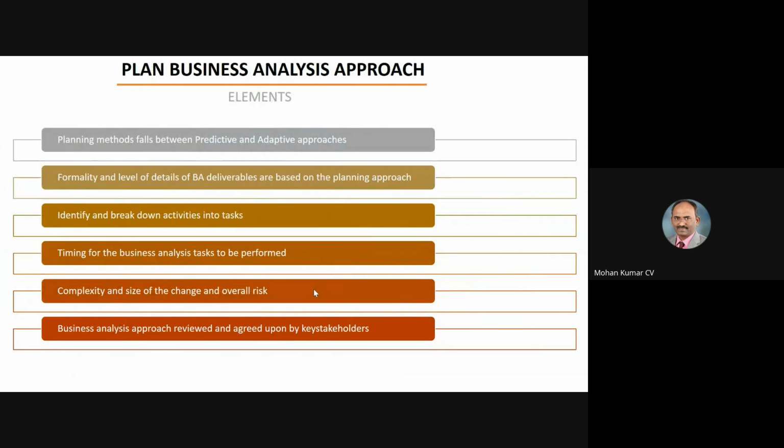Right now, what are the different elements in business analysis, plan business analysis approach? Planning methods fall between predictive and adaptive approaches. So this is important, right? Predictive, what I told you, is where I want the customer to give all the requirements in the beginning only. I don't want to deviate. If any deviation is there, I would put it to the change control board.